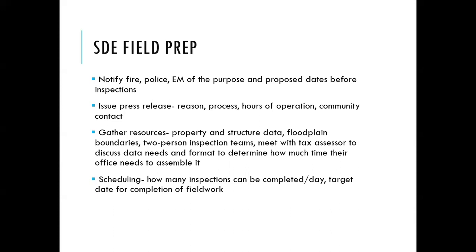So, again, looking at your floodplain boundaries, typically we want to have two-person inspection teams. And that way you have two eyes on everything, making sure the two people are in agreement on the level of damage that they're seeing. And of course, for safety reasons as well. And then you want to meet with the tax assessor to discuss your data needs and the formatting and determining how much time their team or their office might need to assemble all of that.